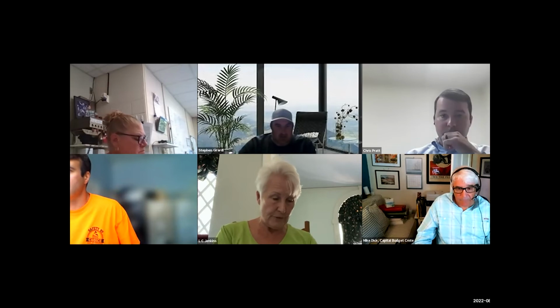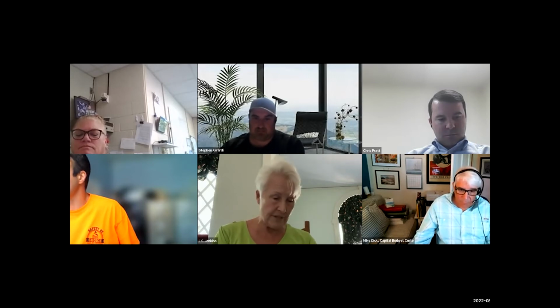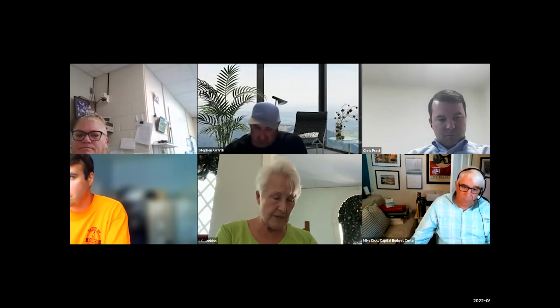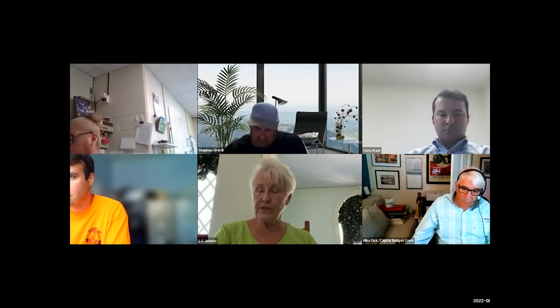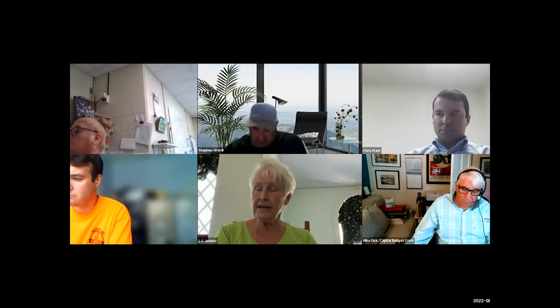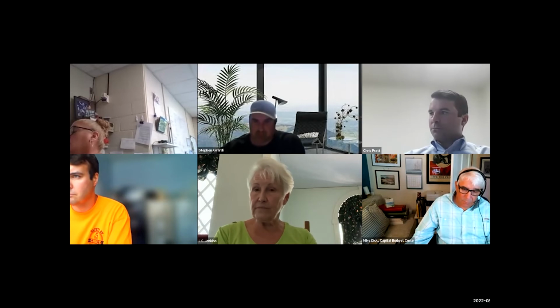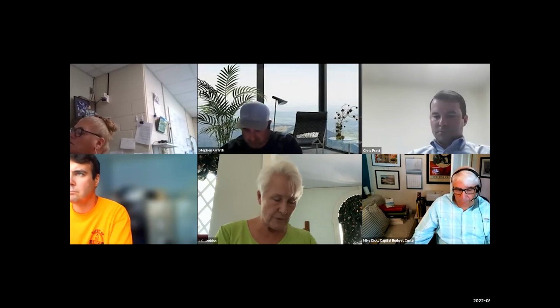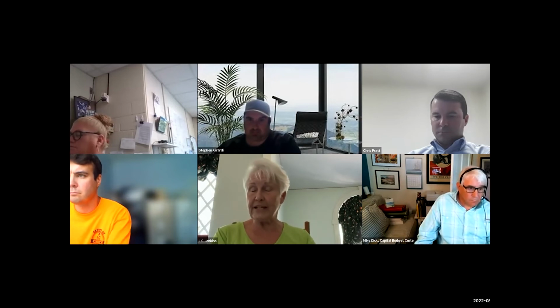Okay, because Brenda could probably send you what she has, but there are some updates that we unfortunately have to make in our numbers because we have that $50,000 in there for GAC filter maintenance, which is not going to be happening because it's not going to be done for 6 to 7 months after the end of the fiscal year. The indirect cost amount is off by $70,000. And then with Woodard and Curran, with the last two extensions to the contract, they kept the amount the same for each 3-year extension. And they requested an increase of, I think $45,000, for this last year that the board granted them. So that number is going to look different unless we can somehow increase it.